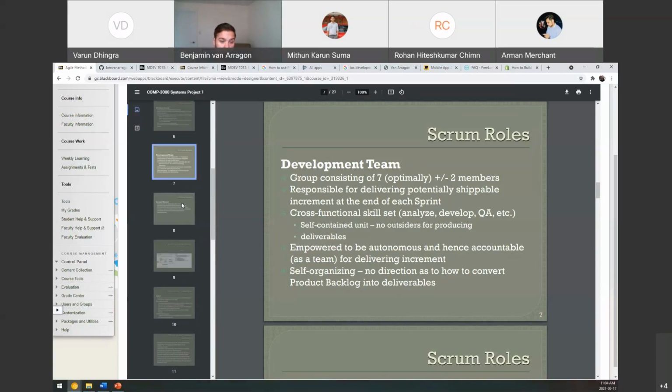And then you finish them every 2 weeks and move on. You take that section from the product backlog into your sprint backlog. Say you take 10 or 15 or 20, whatever you think you can handle, or maybe you take 1 or 2 really tough ones, and you finish them in those 2 weeks, and then they're done. Then you take another set of 10, finish them in 2 weeks, and they're done. And that's the cycle that keeps on happening.